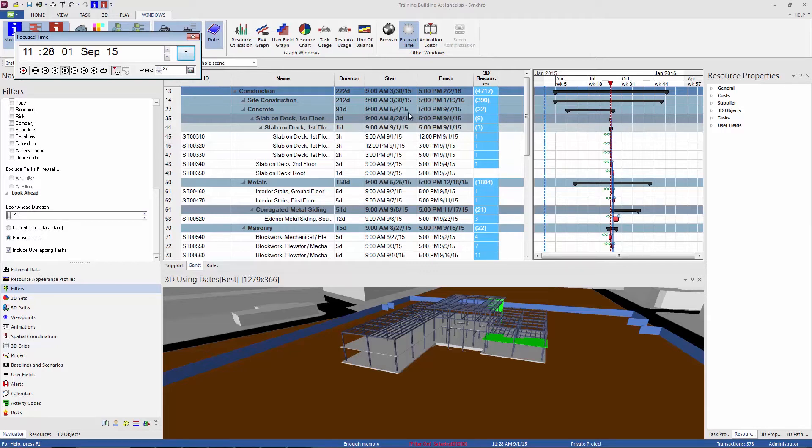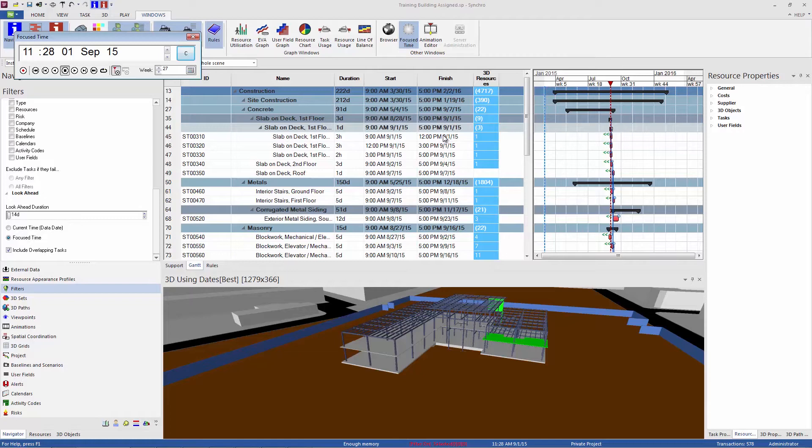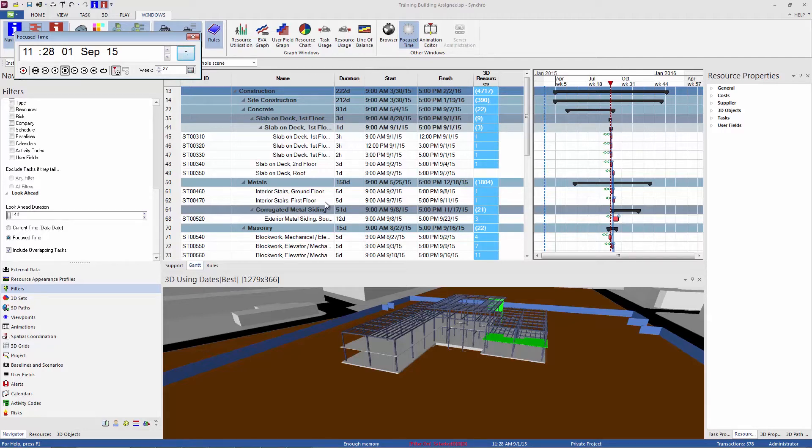And then you can go ahead and print this Gantt chart out. It prints what you see is what you get. So when you have the filter enabled, if you print this Gantt chart out, you can go ahead and bring that as your two-week look ahead report to a job meeting or something like that.